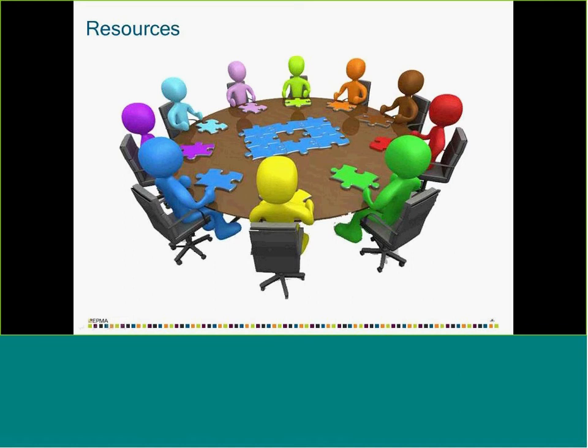The roles that each of these resources play, because the role field is basically used to calculate the availability of a particular role and the average cost of resources in that specific role. We'll look into that detail when we do the resource analysis part. And of course the standard rate, so that we can define the cost of your project.